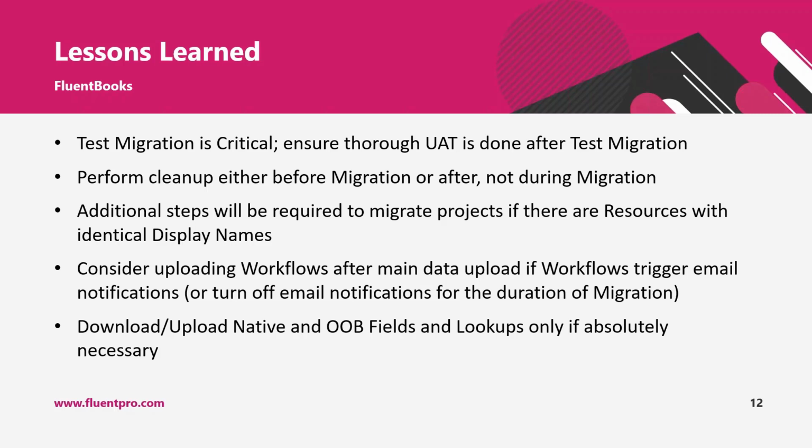If there are workflows, project workflows, or SharePoint workflows in your system, you might want to consider uploading those workflows after the main data is uploaded, if workflows trigger email notifications. The other way is to turn off these email notifications for the duration of migration, because during the data upload, if there are notifications produced, users will receive hundreds of emails, like spamming their inbox.